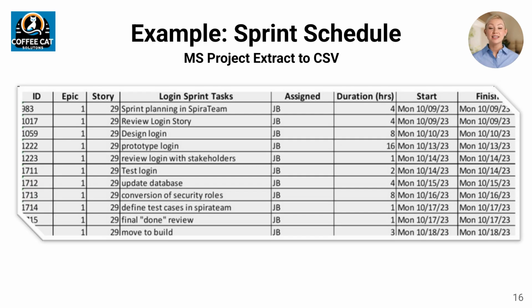As discussed, not decomposing your stories to task level creates a variety of project risks, including inability to accurately forecast work effort, inability to accurately track remaining work, inability to forecast sprint and the overall project timelines accurately, inability to detect late starts, identify bottlenecks, or to test if your schedule is realistic.